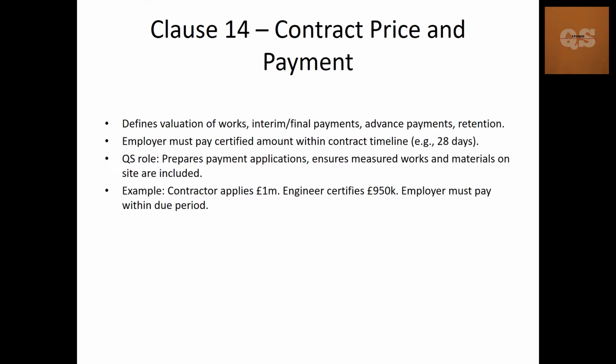How you need to prepare the invoices for that, what should be the backup documents, all these come under this clause. The employer must pay the certified amount within a timeline, and that is also part of the clause. If the employer is not paying within that 28 days timeline, there are different clauses wherein you can get interest for the delay days.